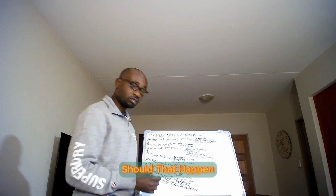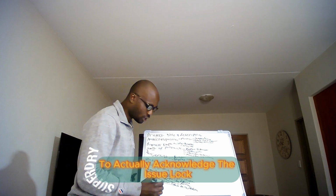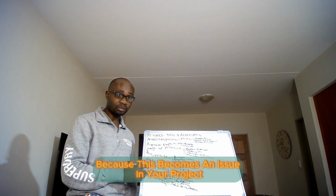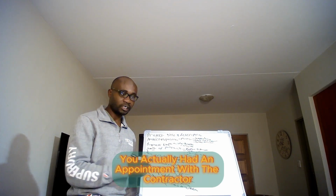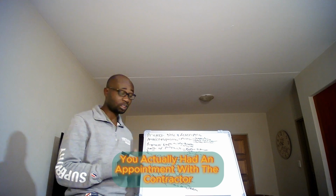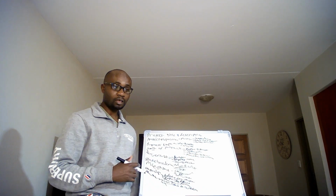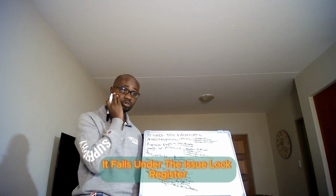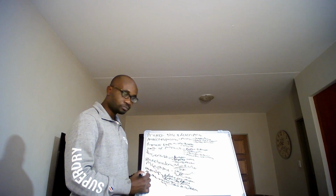Should that happen, you sit down with the contractor to acknowledge the issue log, because this becomes an issue in your project. In the assumption you had an acknowledgement with the contractor that we are not going to have this type of issue. Now you're having it, that means it falls under the issue log register. We're going to get into that in later stages.